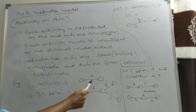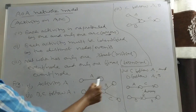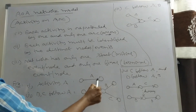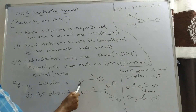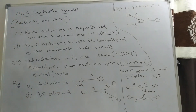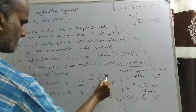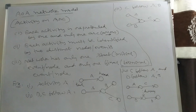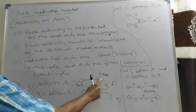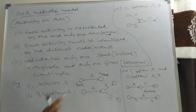For example, activity A is represented by an arc assigned with two nodes. The starting node is called the tail node or tail event, and the ending node is called the head node or head event. Each activity is represented by an arc accompanied by a tail node and a head node.